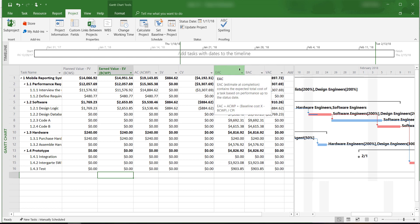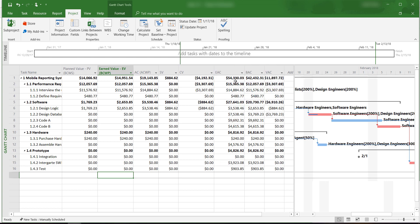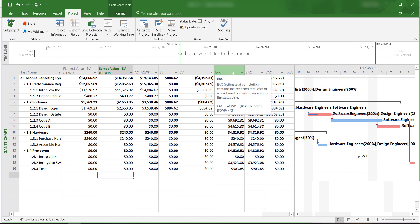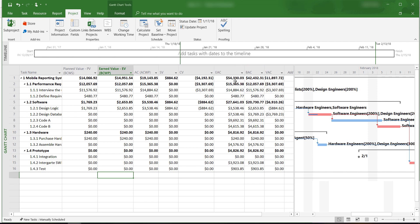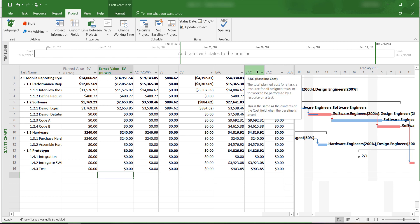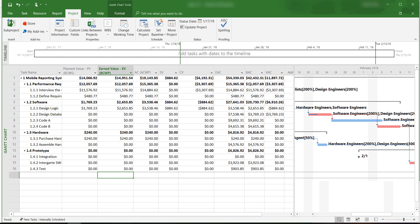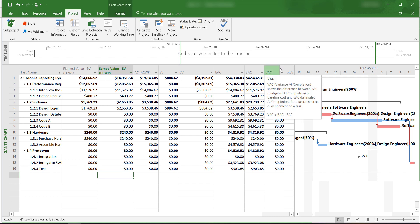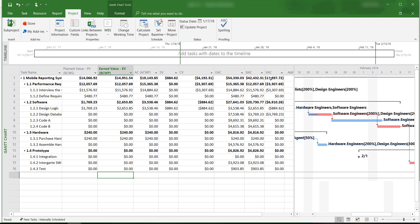Based on the progress so far, the estimated cost at completion will be about $54,000. The planned budget at completion is a little over $42,000. The variance cost at completion is the difference between the two. A negative variance cost at completion indicates that the project will be completed over budget, in this case, by almost $12,000.